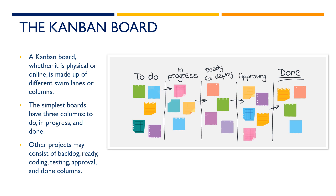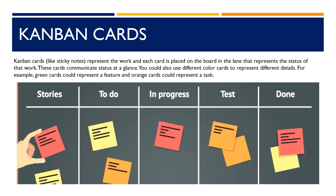The simplest boards have three columns: to do, in progress, and done. Other projects may consist of backlog, ready, coding, testing, approval, and done columns. Kanban cards, like sticky notes, represent the work, and each card is placed on the board in the lane that represents the status of that work. These cards communicate status at a glance. You could also use different color cards to represent different details — for example, green cards could represent a feature and orange cards could represent a task.